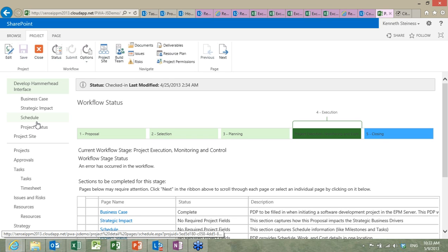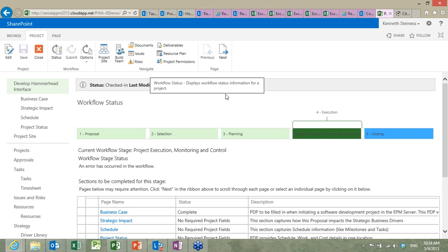So let's look at a couple other things. If you're doing the Outlook integration and you choose to tie your team members' Outlook calendar to Project Server, then whenever they set their status to be out of office or away, it will also reduce their availability in the resource center. I forgot to mention that earlier on the resource report. We, of course, provide support for multiple browsers now, multiple devices. So we use this on tablets all the time now and using a number of different browsers here.